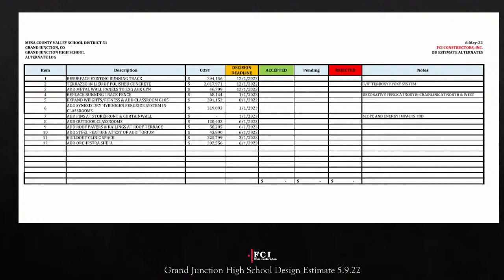to save money. By going up one wall thickness in helical piers is about $800,000. And so just trying to think outside the box and look at, well, let's go to a thinner wall thickness and fill in with grout. We get the same lifespan. We actually get better bearing. So we're working through those details right now and putting together the engineering to make that happen.